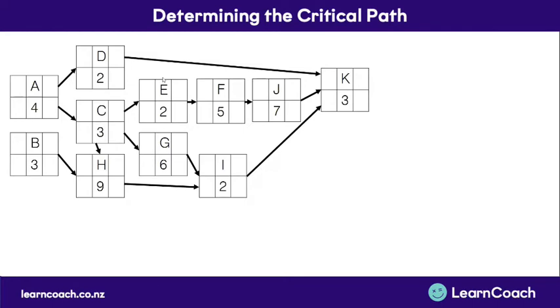Okay. The network diagram, a path is just a certain way you can go from task to task following the arrows. For critical path, there are 3 requirements. First, you must start your path on a task which does not have any arrows going into it, like tasks A or B. Second, you must follow the arrows in the correct direction. You cannot go in the opposite direction that the arrows are showing.